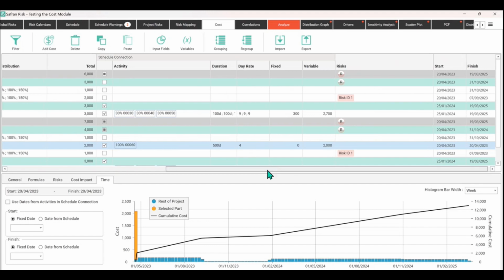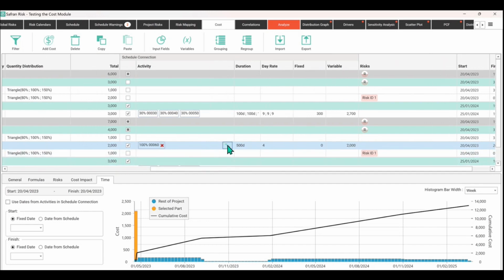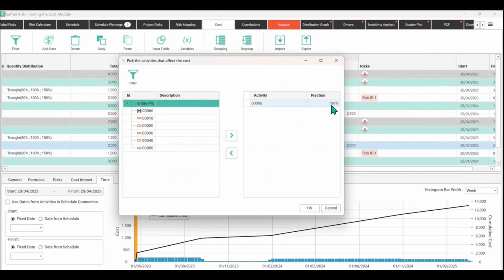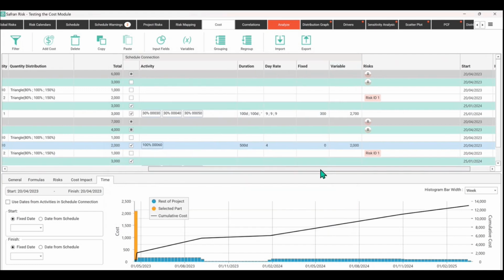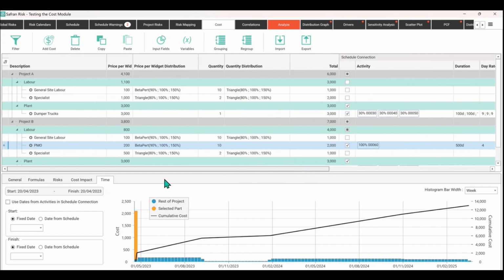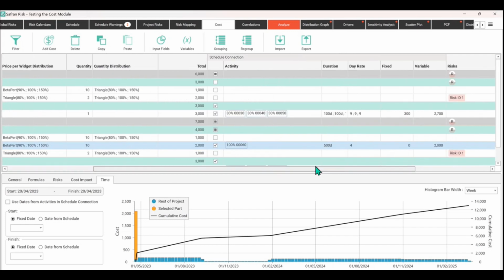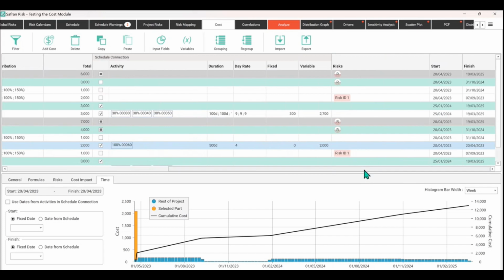If you wanted to, you could manipulate that and say, well, actually, different amounts of money are going to be apportioned to that hammock. But it's just another consideration for how you might want to build these things quicker. If you don't want to go into the minutiae of each cost element or each activity in the schedule, you just want to do it on a kind of hammock basis, or if you're a P6 user, that would be a level of effort, you might call it. So it's just another thing that's worth showing you.